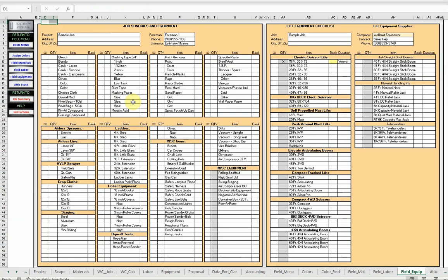We also have on the field list, here's a list of equipment where you can enter the quantities of whatever you want for sundries and it'll keep track of that, letting your employees know before you hit the job site, make sure you have whatever you want. We need 6 tubes of caulking on this project. Notice this went yellow. The back means if you didn't use that, we expect it back. How many of them came back? 2 of them came back. And that lets you know that, okay, now that's done. Then notice over here on the right-hand side, we told it we wanted the scissor lift. It automatically brought this forward and let them know that you need that for 1 week. Did it come back? You can leave that blank if you want to until it actually comes back and returned. Very powerful tool there for you. Again, we don't know of any other software package that has this as a feature of their software.